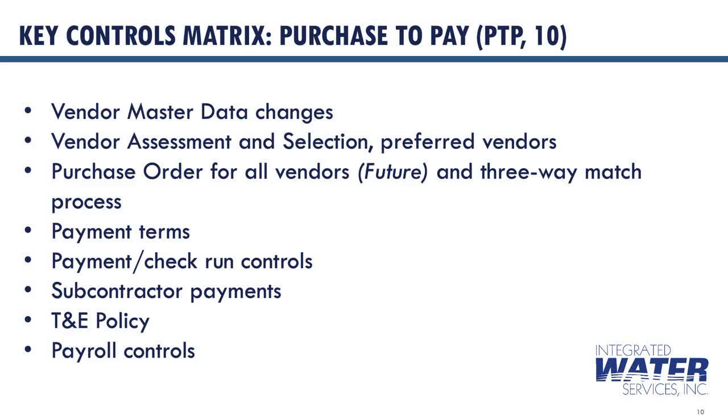Our standard payment terms are either pay when paid, which means we pay our vendors the invoices related to a project and period when we have been paid by our clients. Or, alternatively, if payment terms are defined in days, our standard is 60 days from invoice date or more. Any different payment terms with vendors, including paying in advance, need to be approved as per the delegation of authority.